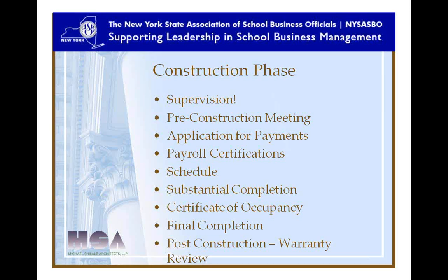And then after substantial completion, really the district is responsible if they move in furniture and things like that and cause some more damage. If it hasn't been identified on the punch list, it's not the contractor's responsibility. So that's something to take very seriously. You'll get your certificate of occupancy from SED once we send up the substantial completion documentation to them. Sometimes they'll even give you a verbal if you're trying to move in time for classes, and the paperwork can follow a few days later. But for the most part, they want to see all that documentation.